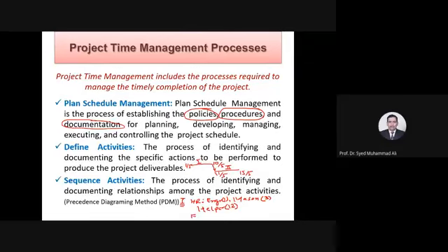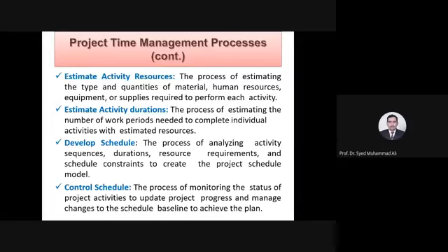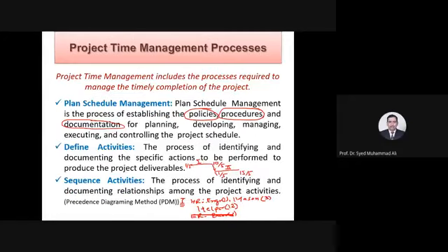Then you have equipment resources. You need an excavator, 1 number, and so on. So you have to estimate the resources, what type of resources you need, what is their quantity. Now, quantity of human resources also is required. Also of the material is required. How much excavation will be done, for example, and many other things which are being consumed over there.